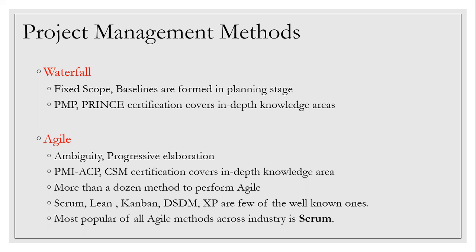it will lead to a lot of time loss, and by the time they launch it, say they take 2 or 3 years, the entire technology will change and the competitors will come up with 100 more features. So they don't want to stay in a sleepy mode. They want to launch the product to generate revenue faster. So they call it minimum viable product, MVP, which means get the minimum features with which we can launch the product as fast as possible.